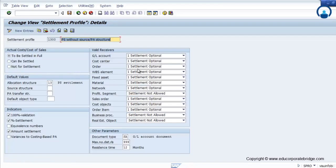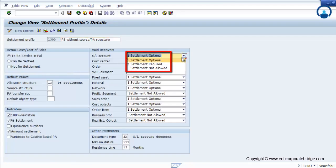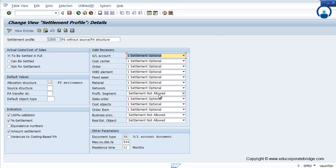Here you can find different options: whether settlement is optional, required, or not allowed. For example, I don't want to settle the cost across the profitability segment, business procurement, or real estate object — I can set the flag as settlement not allowed. Where I have to do the settlement, I can set it as optional — either against a GL, cost center, WBS, or order. Then I allocate the allocation structure and source structure across the same.